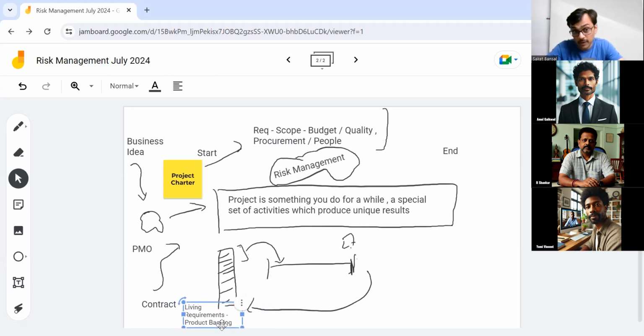And these ideas might be wrong. That's a risk. They may not make the desired impact. And that's why you are implementing them piece by piece. So you take some small portion of the requirement, you develop it, demonstrate it, collect the feedback, and correct yourself. So every two weeks you correct yourself. In the agile world, we use the words inspect and adapt. So you keep changing your direction, and that way the risk is taken care of because you are not planning too much ahead in time.